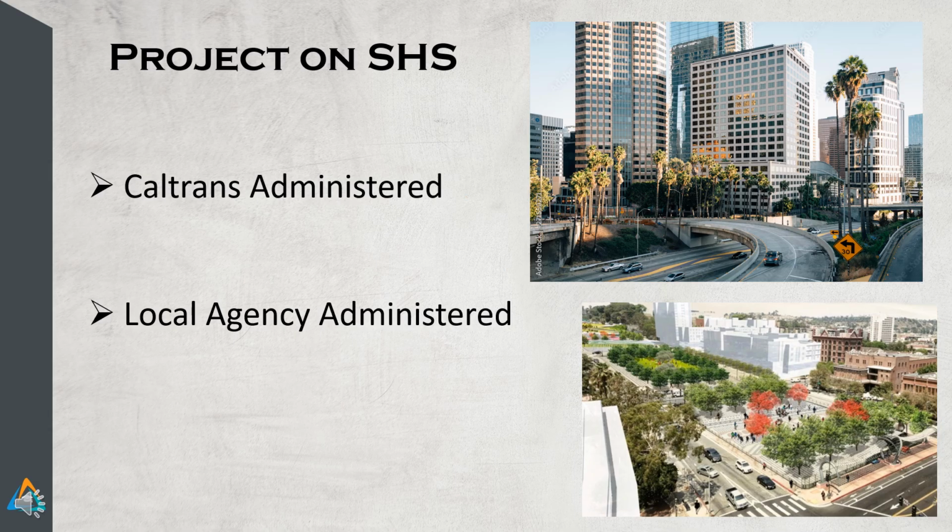There is the other kind of project, which is an encroachment permit project, where the local agency might be encroaching or working adjacent to state right-of-way. For example, there's a city project. The city is working close to the on-ramp, so they're working within Caltrans right-of-way, and they might come to you for an encroachment permit, maybe for landscape work. That kind of project could be a Design Engineering Evaluation Report, or DEER, permit project. Typically, for these projects, Caltrans supports a local agency by doing more than IQA work.